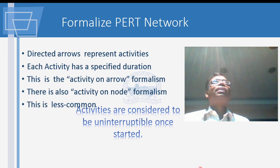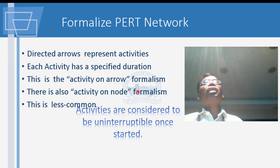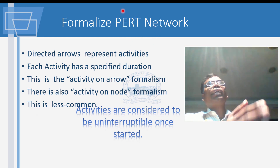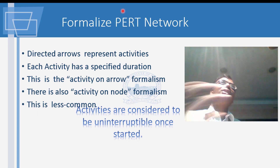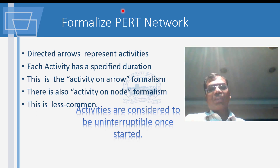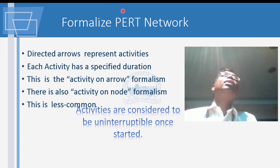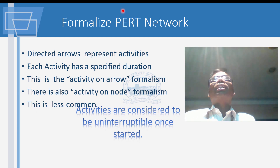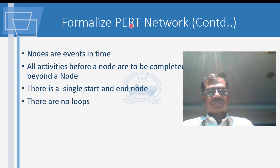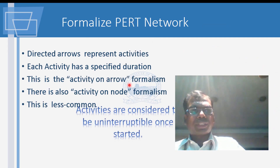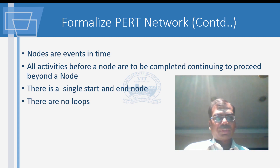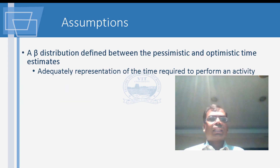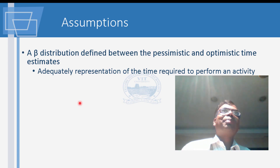PERT uses three measures of time. For example, traveling from central station to the airport: on a very good day you can reach in 20 minutes, but with traffic it could take two or three hours. Similarly for construction, you estimate an optimistic time — say finishing concreting in one day — but the most likely or pessimistic scenario is longer. PERT uses a beta distribution.